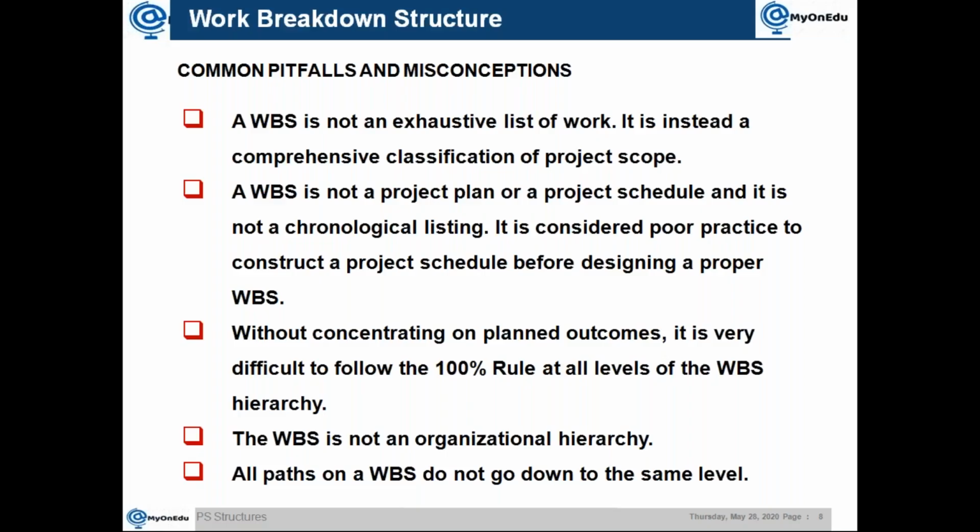So what happened, people will create the WBS as per BOQ. Then it will be 3,000, 4,000 WBS elements, just structure, nothing can be understood from that. And the person who is managing at site, the execution guy, will not be able to handle it. Then this will become a problem.